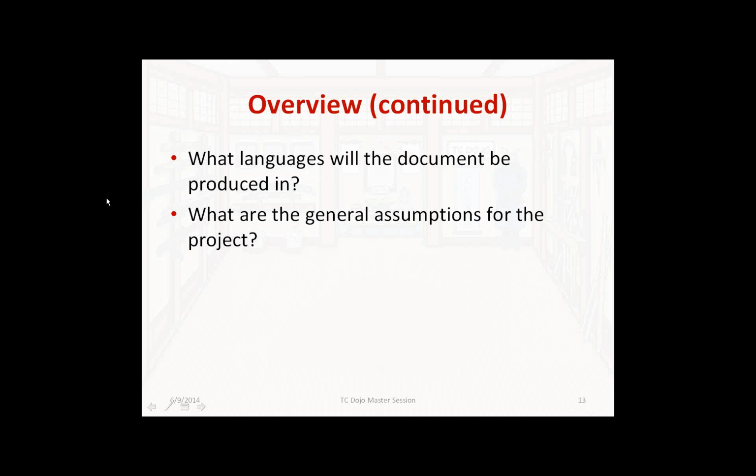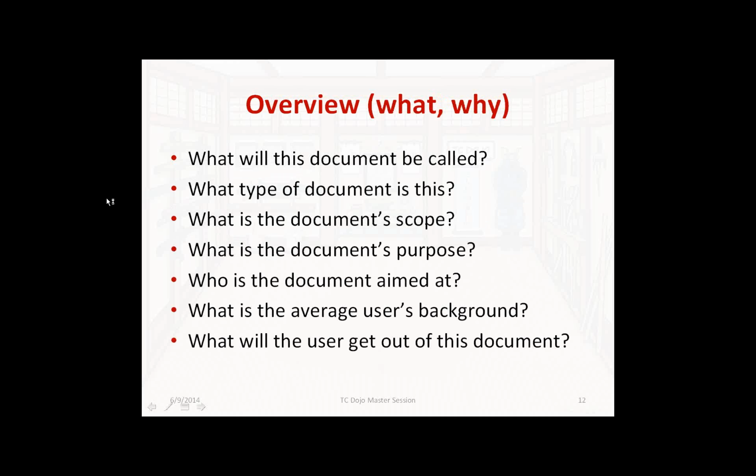And that once they've had the nominally final version of the document for 10 days and they haven't squawked, then their silence means they've bought it as is. Again, this is for clients who may want to try and get cute about not paying for something. You might also in here have what your responsibilities on the project are.